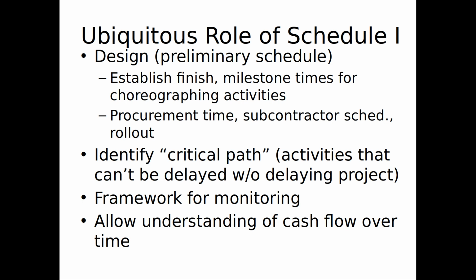It's a sequence of activities that cannot be delayed without delaying the entire project. And that implies, the corollary to that is that there are some activities that can be delayed without delaying the project. There are some activities that are less critical that they be kept on track schedule-wise. We have some leeway with them. And a technical term for it is slack. Okay? We have some give when we schedule those activities. But the critical path activities we have to keep on, because if they slip, the whole thing slips.